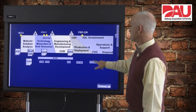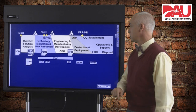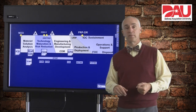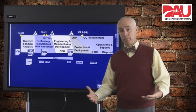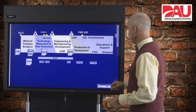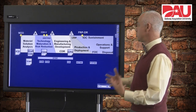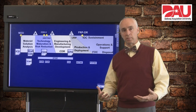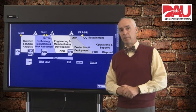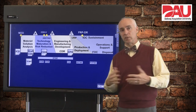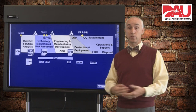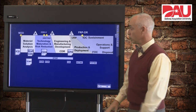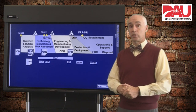If we have some problems or changes to our system past our low rate initial production and our IOT&E, we may do some follow-on test and evaluation — which is also an operational test event — to see if the fixes that we've put in place are actually working or not. This depicts, timing-wise, generally where you see each of these test events across the lifecycle. Recall that this is a flexible system, so you need to develop your test planning based on what you need at each of the milestones and the information you already have on your system, so that you're doing enough testing to make good decisions and not wasting money. And remember that we want to, where it makes sense, combine our operational and developmental testing.